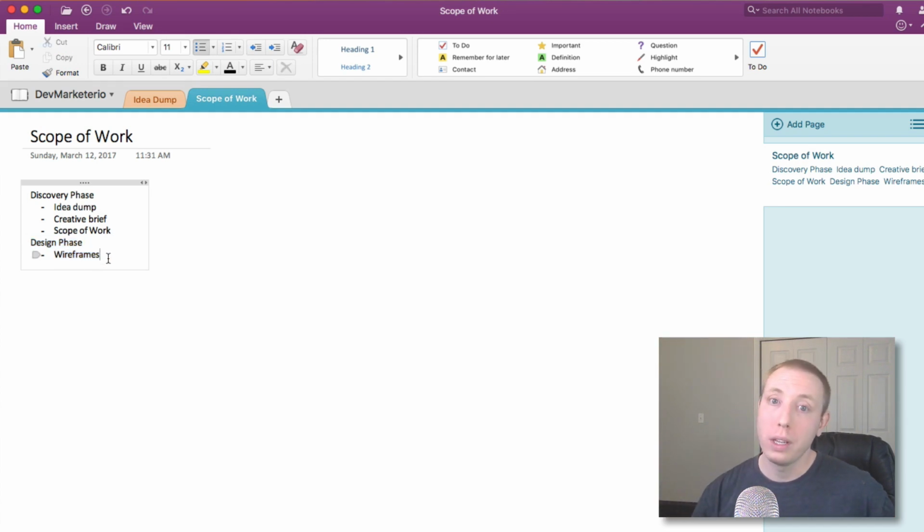So wireframes are really important and really good because they allow you to hit major elements, like major organization, early before you put a lot of resources into design. For example, on the homepage, let's say you skipped the wireframe and made an elaborate carousel, and then the client doesn't want a carousel, he just wants a hero. Now you've wasted a lot of resources designing a fancy carousel that might have taken 2, 3, 5 hours, whereas with the wireframe, it wouldn't really take more than a couple seconds, right?